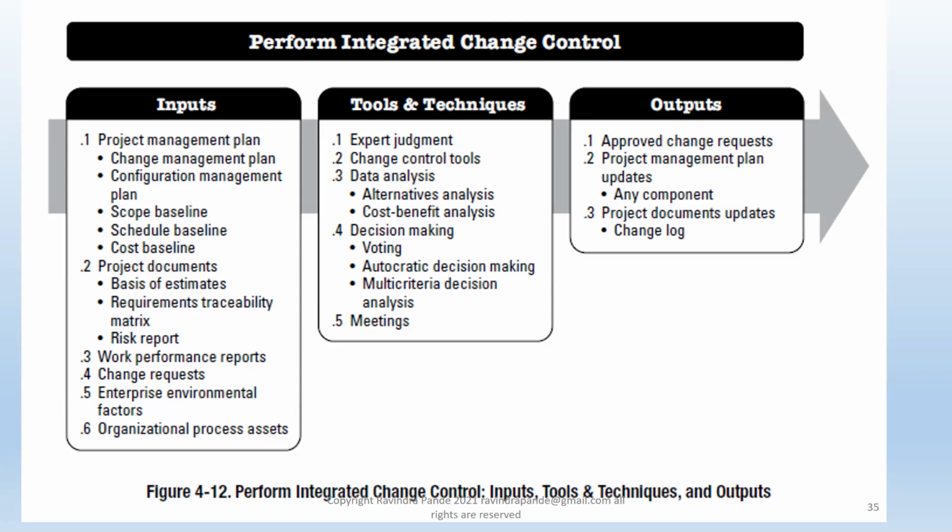That's also something we're going to discuss there. Again, the RTM, we have discussed the RTM. Just to recap, the requirement traceability matrix is a table where we normally trace the requirement from start to end. And that's how we take the RTM as an input here, to make sure whatever requirements we are considering for the progress, in terms of how we are doing the integration day by day, sprint by sprint, phase by phase, it has to be tracked with these RTMs as well.